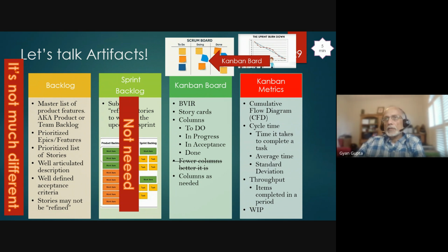Think about a donut shop. By the time your dough gets into the fryer, by the time a donut comes out, how much time does it take? Can we adjust that time? Maybe we can turn the stove a little higher to heat up. Maybe go faster? Oh, no, maybe not, because we'll burn it. Can we do it slower? So once you have data, you can take action to improve or change things. So cycle time is a key indicator.